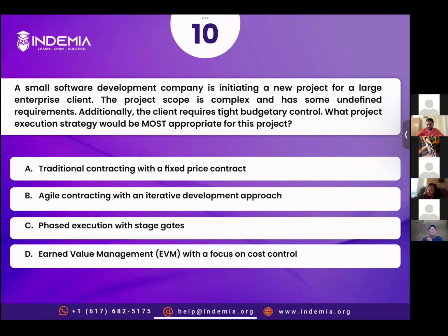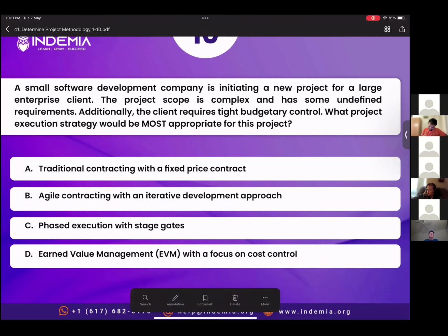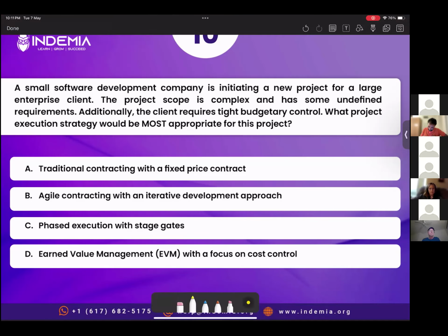All right. Modit, you have chosen option B. Yes, because this is a project which is very complex and has undefined requirements. So going with an agile methodology will be helpful. And since the requirements are undefined, there will be added features sometimes or changes in the features of the project, and hence the iterative development approach will be helpful.